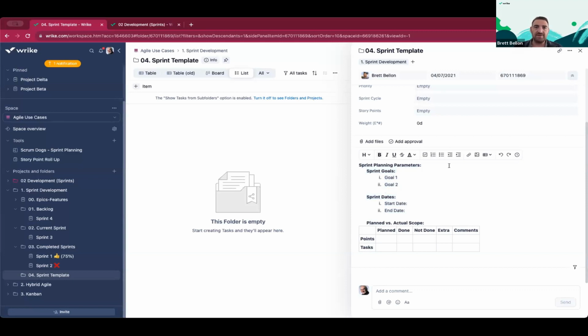Let's say right at the beginning, you go over time off. I remember this was a big thing for us: we assumed something like 15 hours per sprint for meetings, so we had a 65-hour bucket of available time. But if you had PTO, or were leaving for an afternoon for a doctor's appointment or whatever, we would call those out and get our numbers lower, and we would often call that out in our notes here.